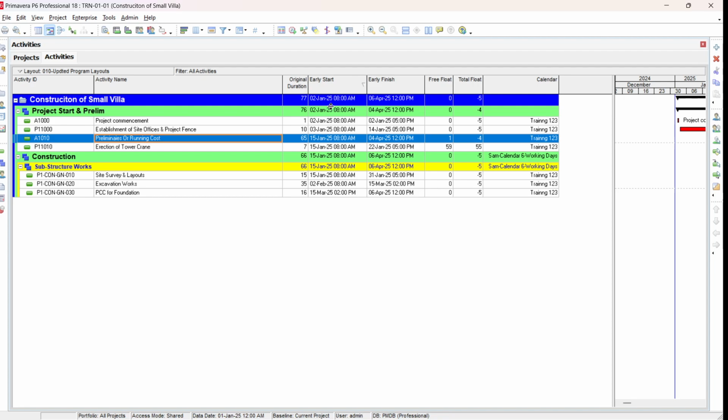So now you can understand the importance of the calendar. If you don't define 1st January as a holiday, your work will start from 1st January, but actually 1st January is a holiday. In this case, your project will show a 1 day delay without any reason, and you have to give justification why there is 1 day. To avoid this, it is better to assign the calendar with realistic holidays and working hours, and assign the activity calendar to activities.